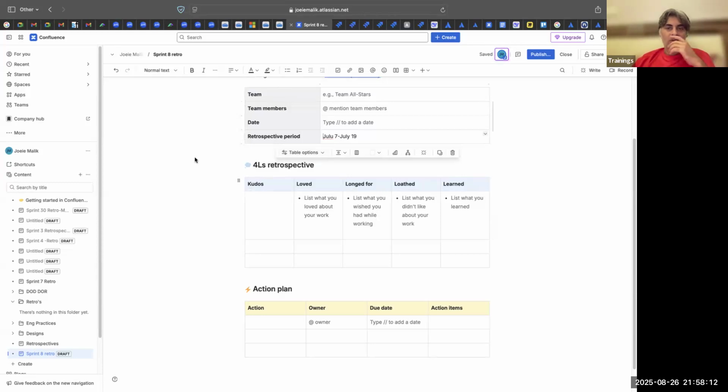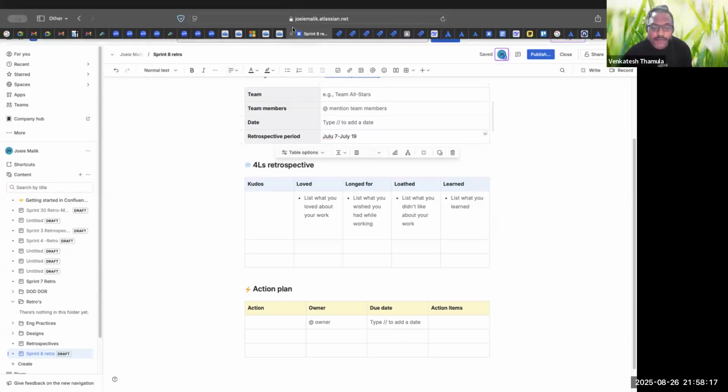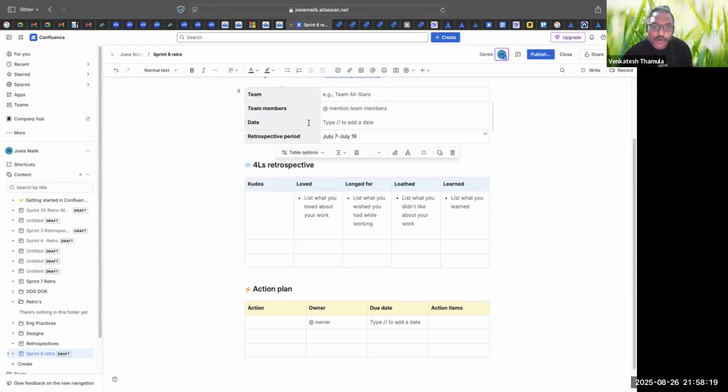Yeah, Venkatesh, you have a question. Sir, retrospective is a time-boxed event. In interview questions, for a 2 week sprint, what is the time you take for retrospective? I think the recommended is 1.5 hours. I don't recall, but you can check it. 1.5 hours for a 1 month sprint is 3 hours, so for 2 weeks it will be 1.5. But generally in practice, it will finish within 1 hour. 1 hour is too much, less than 30 minutes is enough.